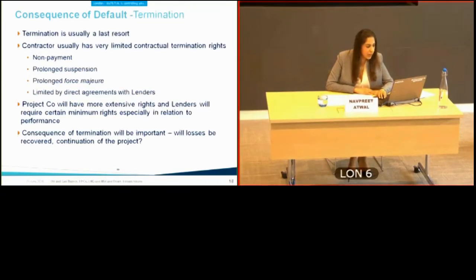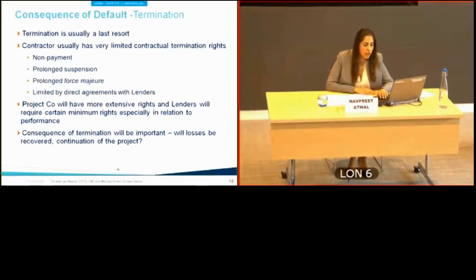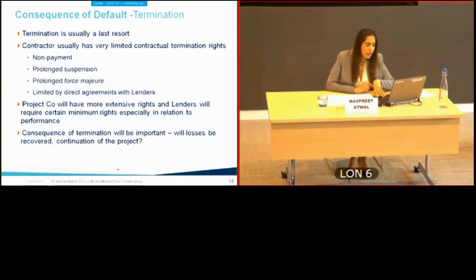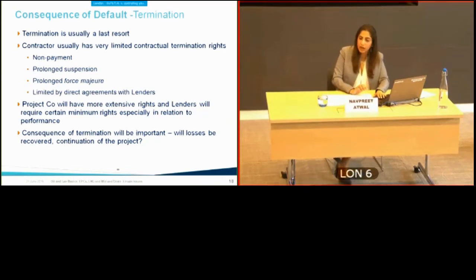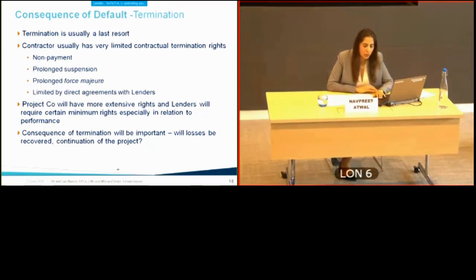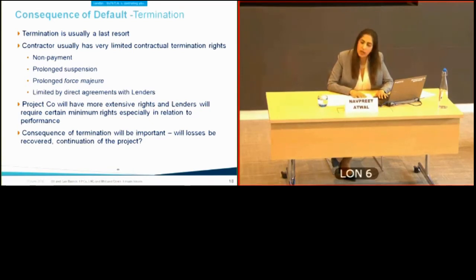Termination is usually a last resort. Lenders have a direct agreement with the EPC contractor, making them keen to ensure the facility is completed rather than invoking termination rights. What is key for lenders is ensuring losses are recovered on termination, including mobilisation costs for a replacement contractor recovered from the outgoing EPC contractor.